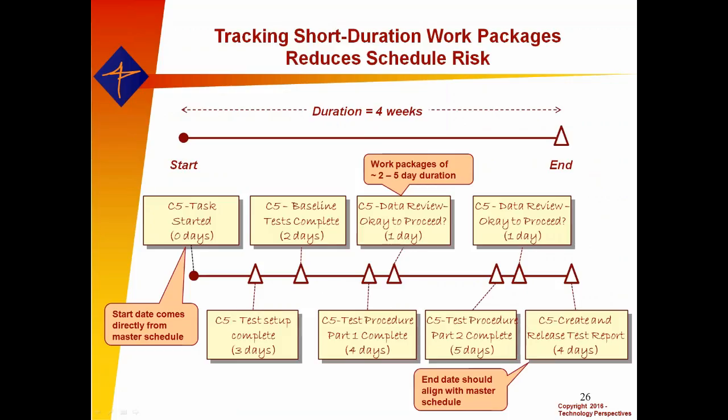This is just an example of what might be on the Post-it notes. If you had a 4-week task on the master schedule, I would ask whoever owns that task to break it up into incremental steps, call them work packages. 2 to 5 day duration is the granularity we're looking for. Each one of these would be written by the person who owns the task.